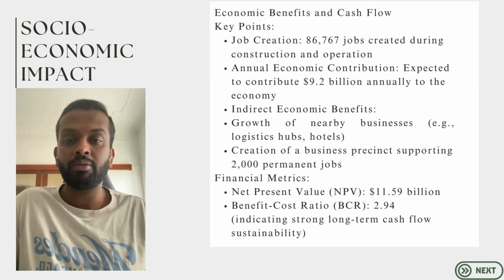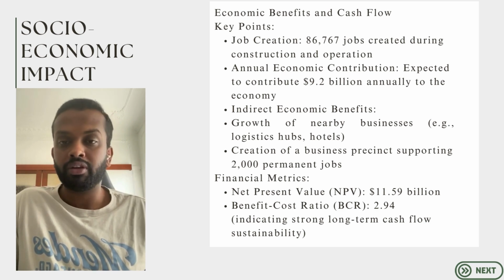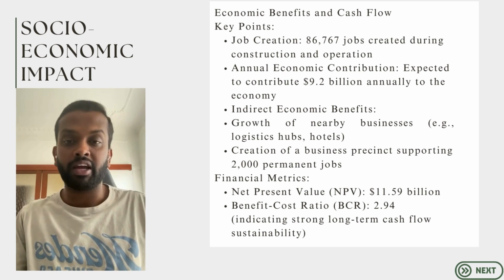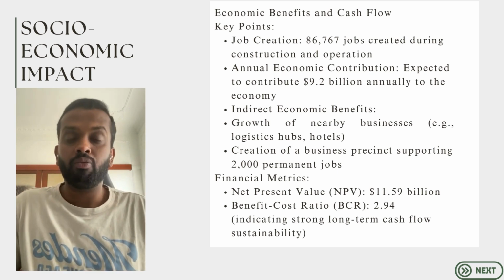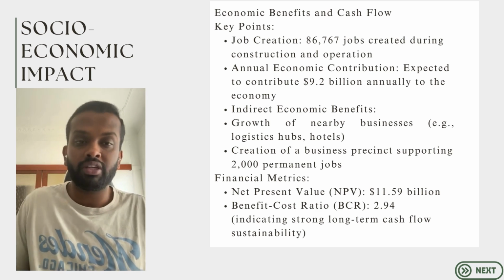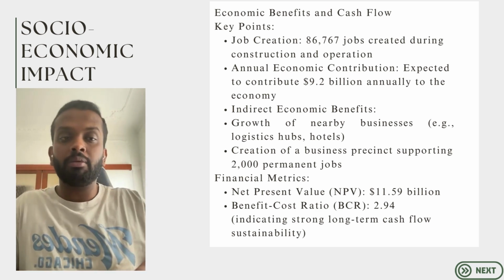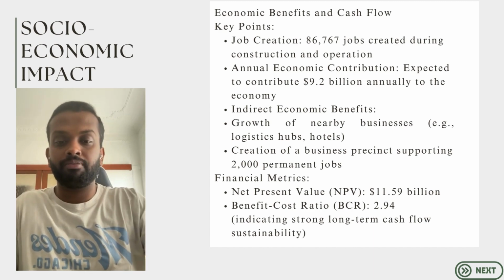Financially, the airport gives a net positive present value of $11.59 billion and a strong benefit to cost ratio of 2.94, which indicates the long term benefit of the project and setting up the sustainable cash flow for the future.